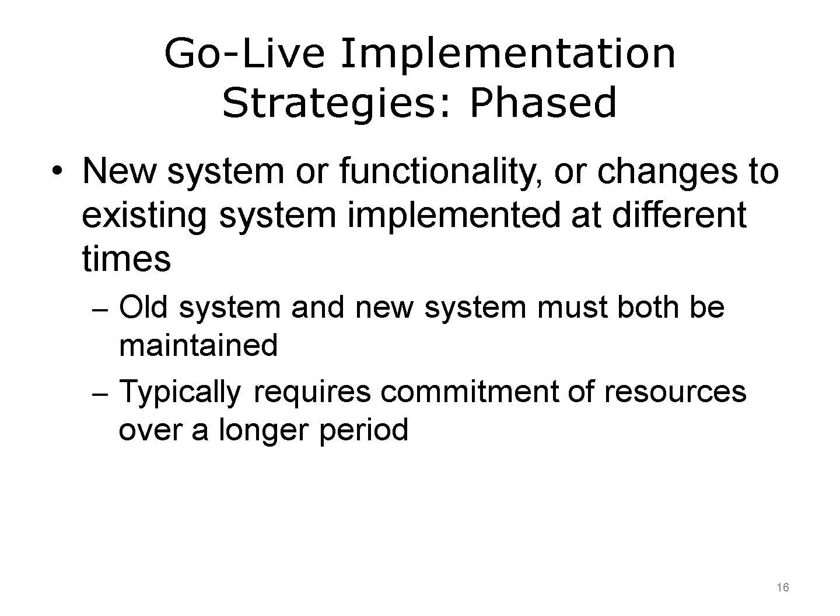With the phased approach, the old system, old IT system, or old paper-based manual process, must be maintained and supported until all of the phases are completed. This approach creates a need for dual business processes, user documentation, and so on during the interim period. Also, from the perspective of resources, such as financial, staffing, time, and services, there is typically a longer commitment with the phased approach.